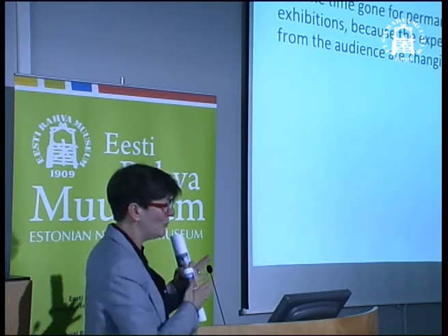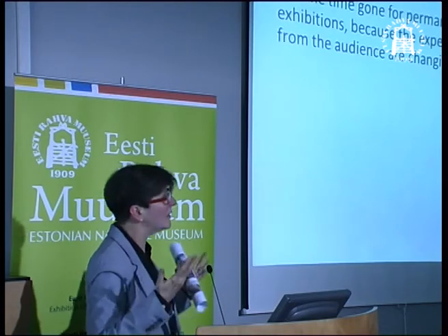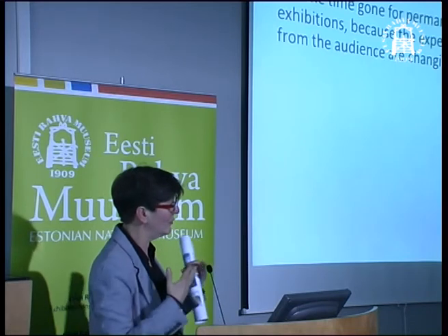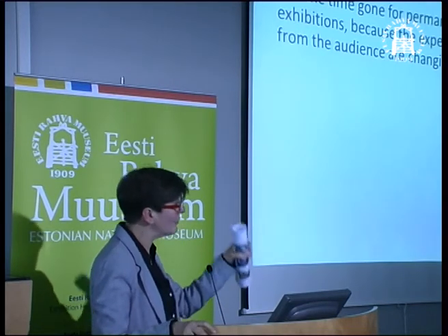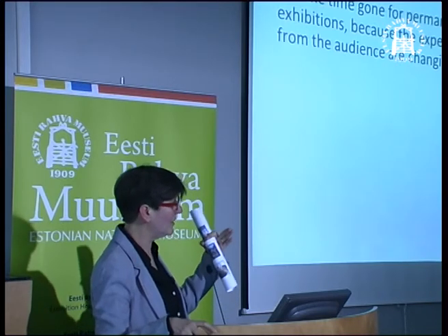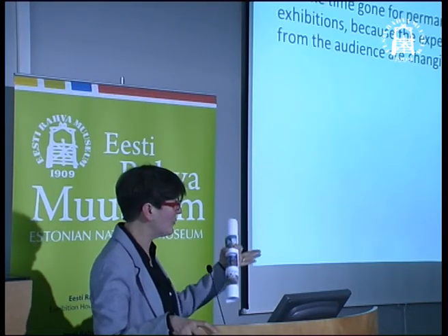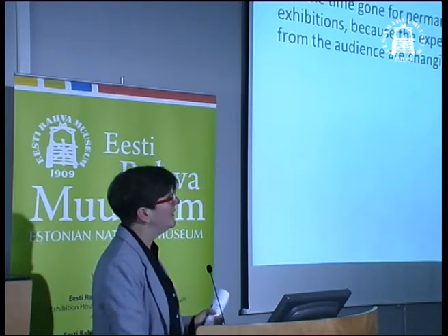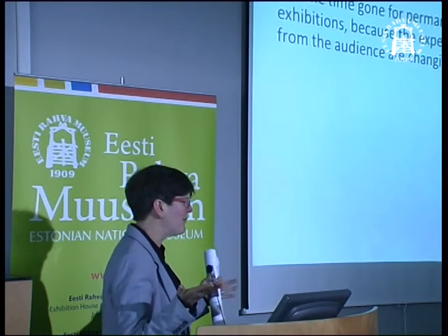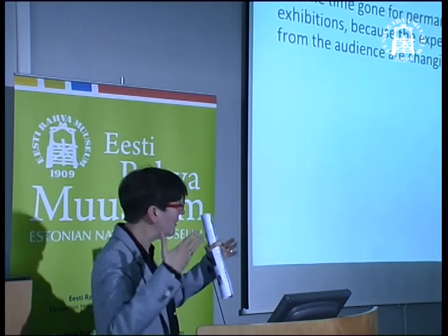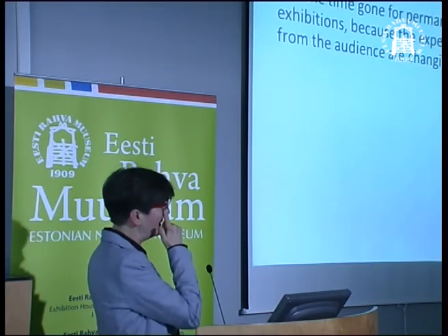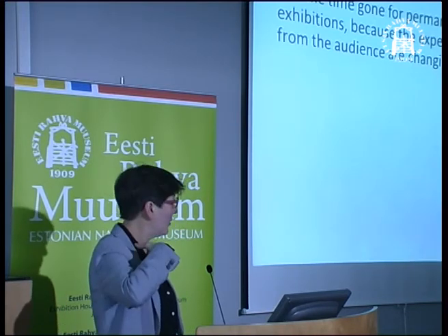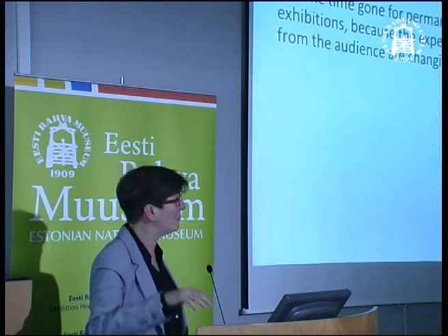Because normally curators are used to doing their own field, and it was very challenging for them as well because they have different methods of working, and to connect in that. And it was also new that they are not having the totally leading part, that I was a project manager. It was also something they have to get used to. You were the boss. Yeah, I'm not the boss, but I'm just trying to get everybody coming in. And we have, as we've seen before, a project owner on top. Also, when I have problems, then I go to the project owner or to the steering group.